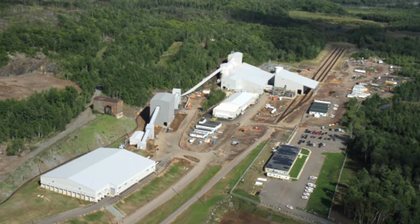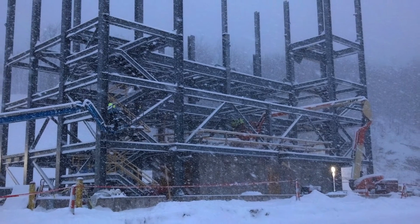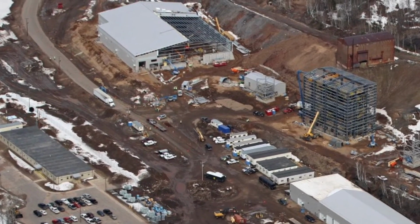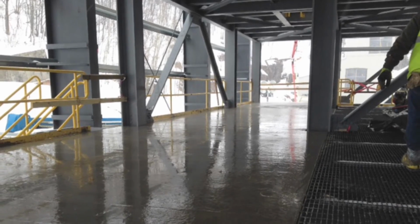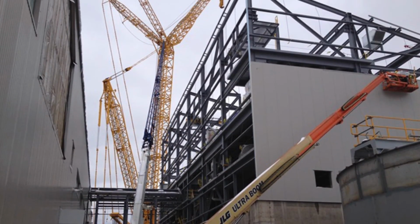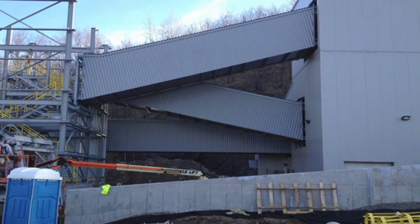Gunlock Champion is uniquely familiar with the importance of mining in Michigan's Upper Peninsula, so the opportunity to work on the Eagle Mine project was right in their wheelhouse. Gunlock's self-performed work scope included installation of concrete, masonry, structural and miscellaneous steel, pre-engineered metal buildings, conveyors, and major equipment. A fast-track schedule, crowded working conditions, and more than 750 RFIs were among the contractor's challenges.